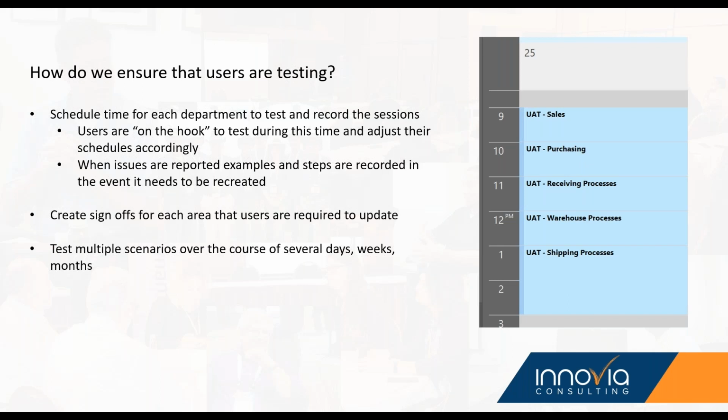If we're looking for, say, tracking number to be populated on an invoice, on a pick ticket, or on a packing slip, any number of things, I always encourage everybody, test FedEx, test UPS, test maybe an LTL just to see what results you get.